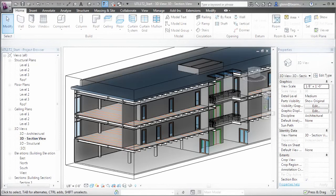The quantity of materials for the layers at the inside of the wall are typically less than the quantities at the outside surface of the wall. While this may be a small difference for a single wall, across an entire building this can add up to a significant difference.